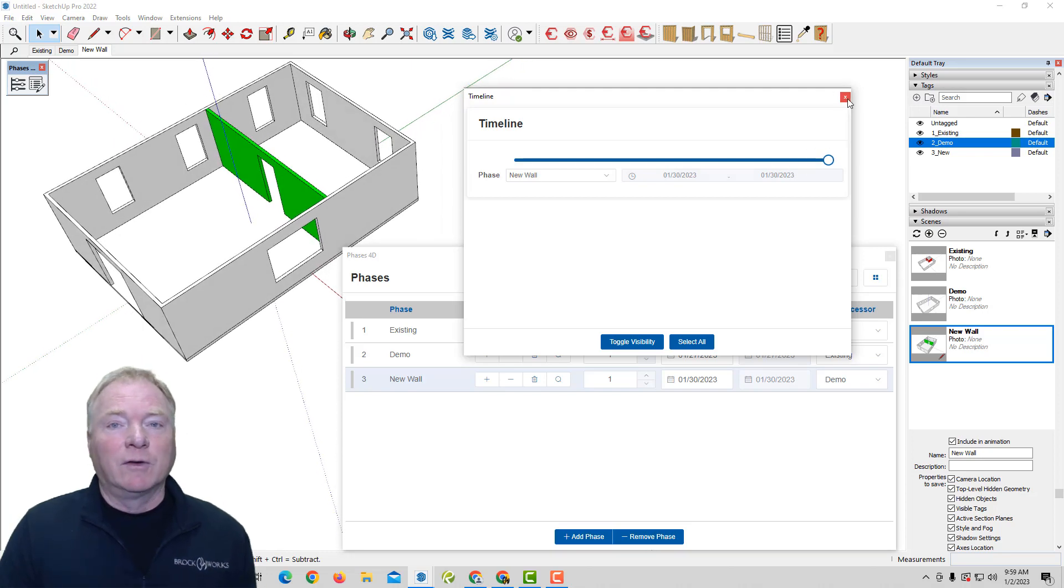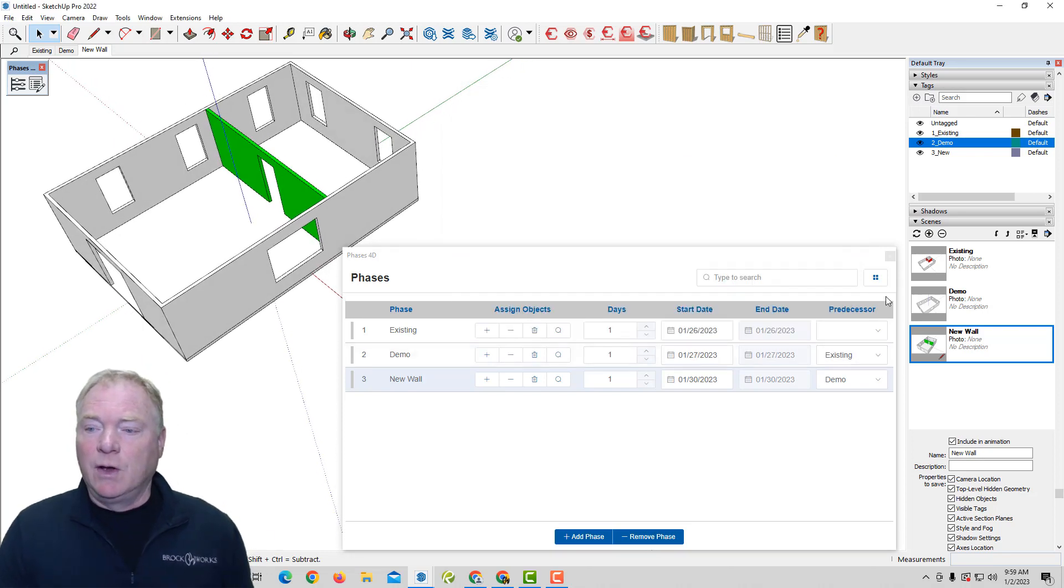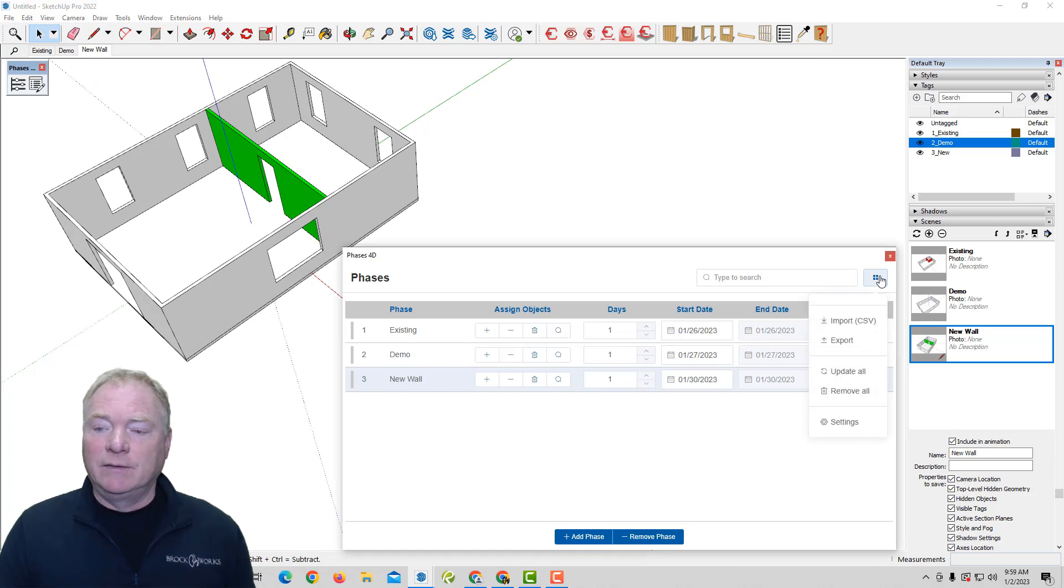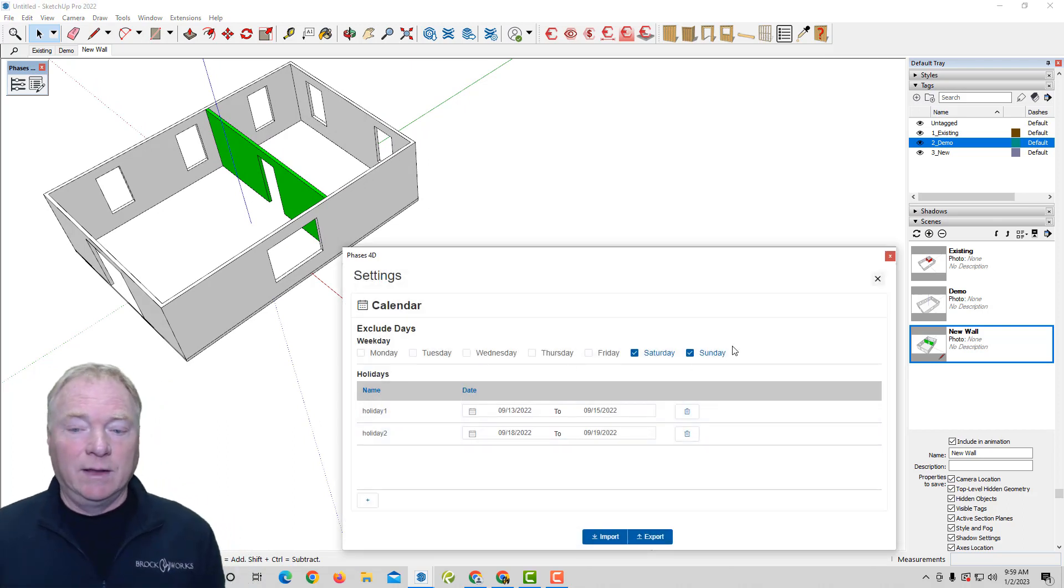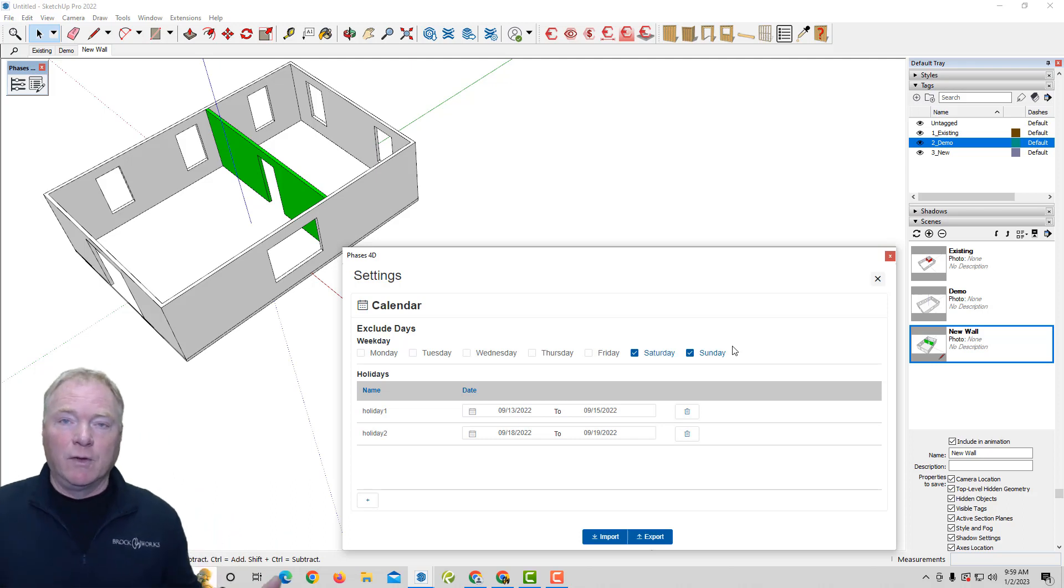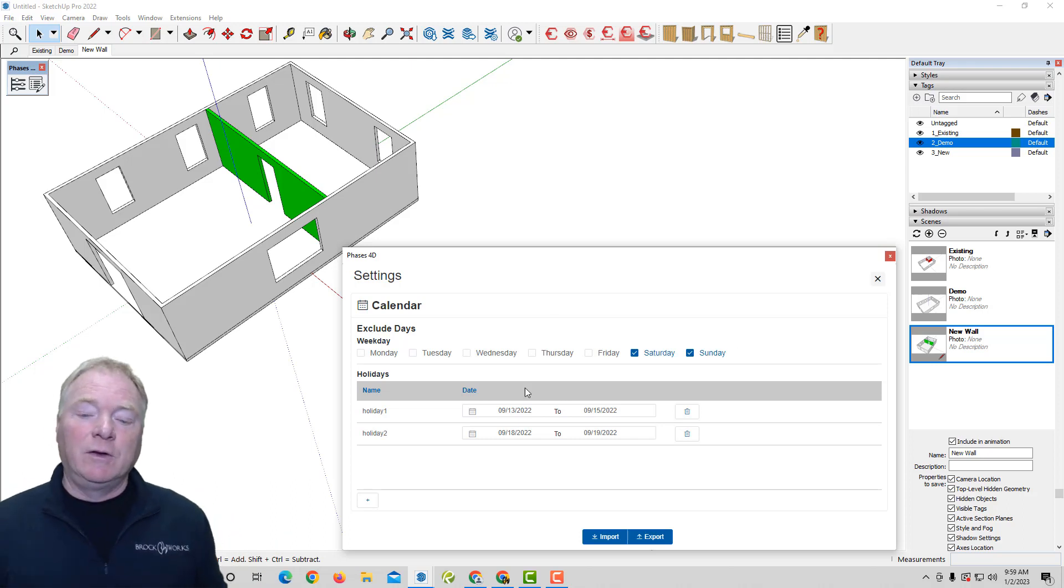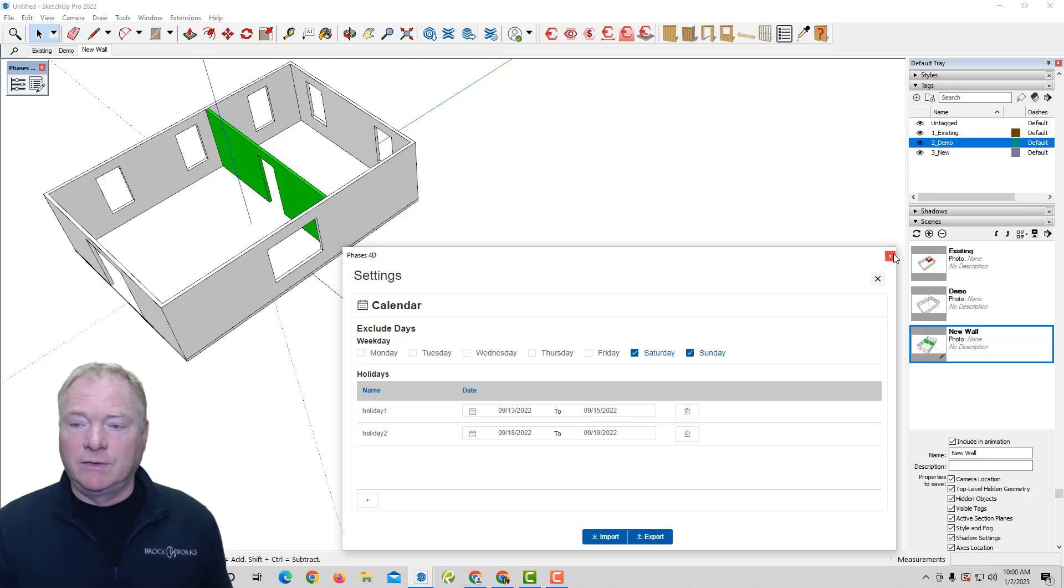So to show you how that works with the weekends, which is non-workdays, you could go into your settings and you can choose what your non-workdays are, like weekends. If you want to, you can control that however you wish. And you can also add holidays, Christmas, New Year's, and that sort of thing. So that's under your settings.